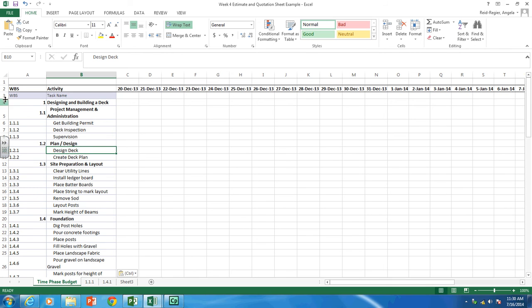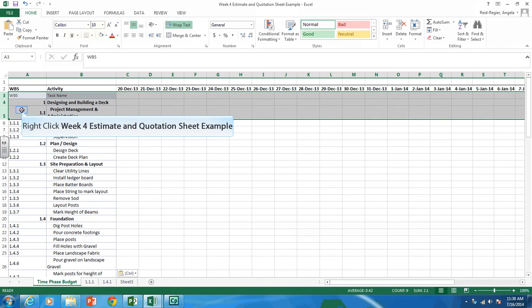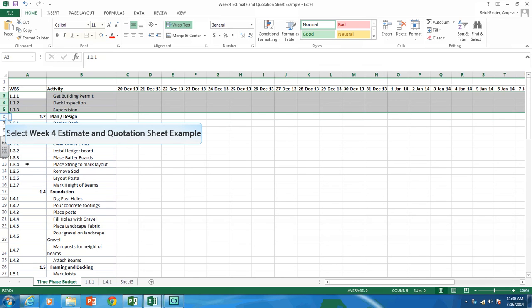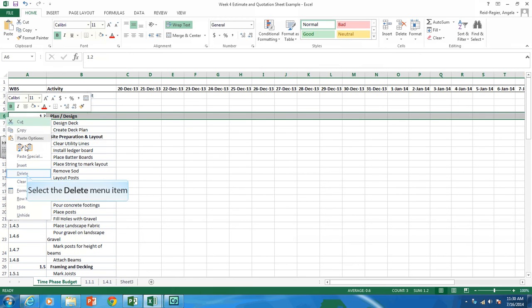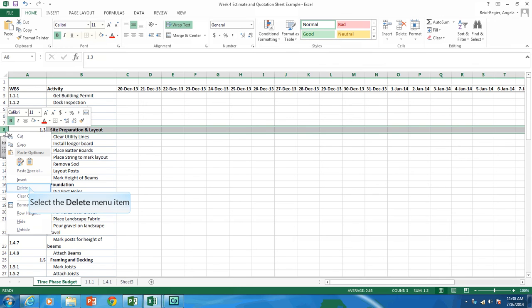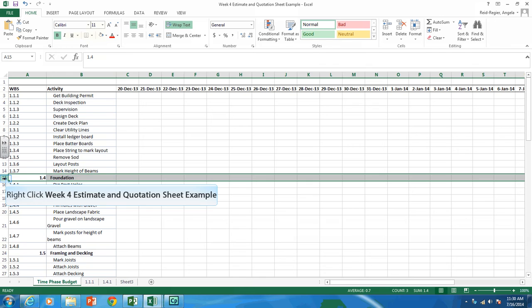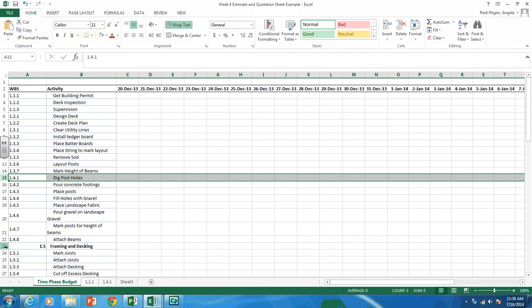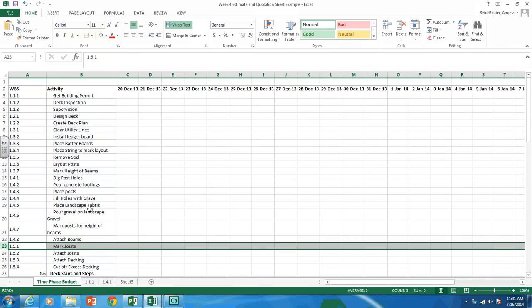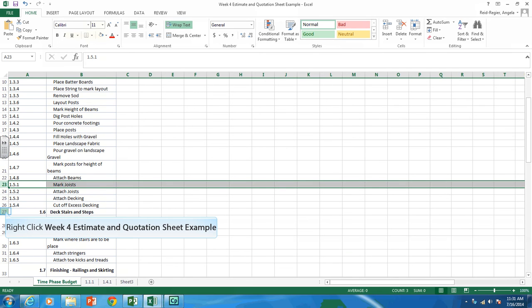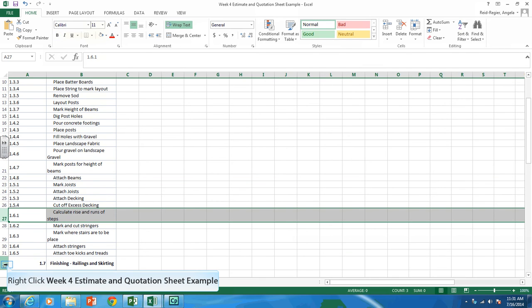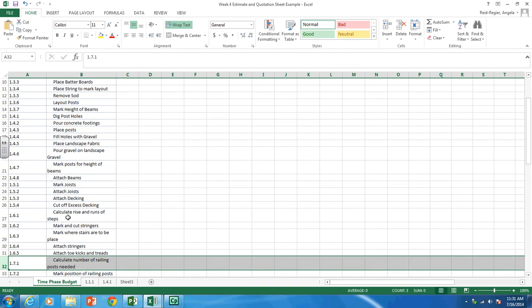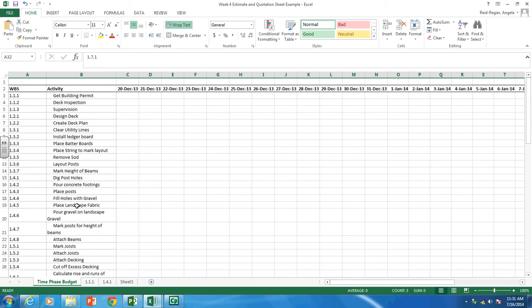So we're going to want to get rid of the summary activities. We only want the work packages here. So delete the titles and anything that's bold. Again, work packages are the lowest level of your work breakdown structure. And that's what we want in our budget.